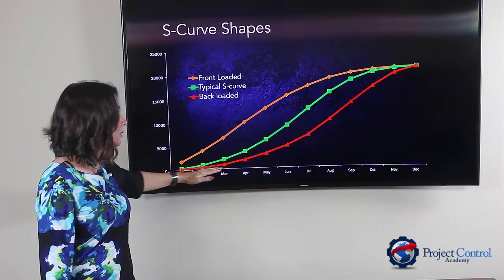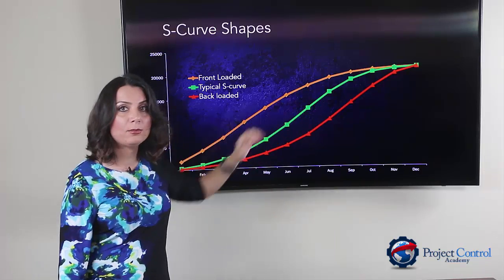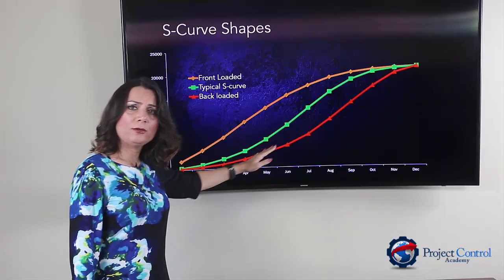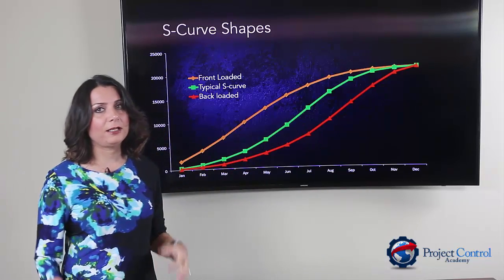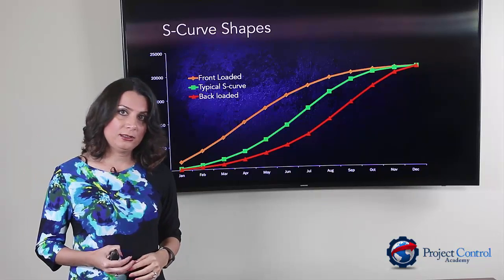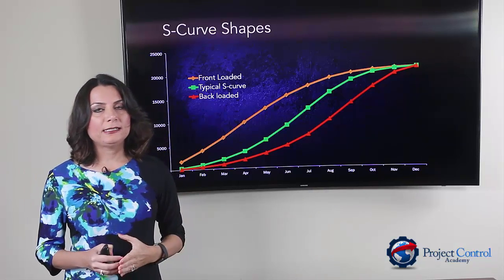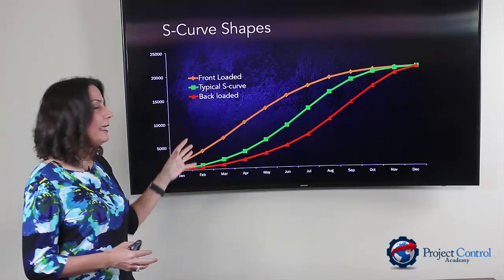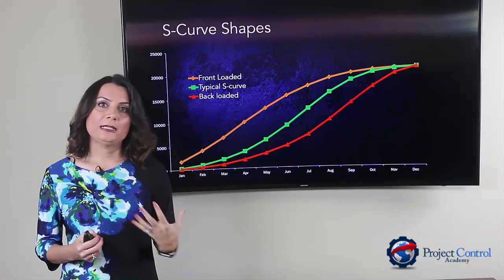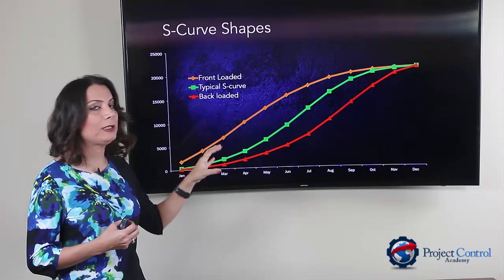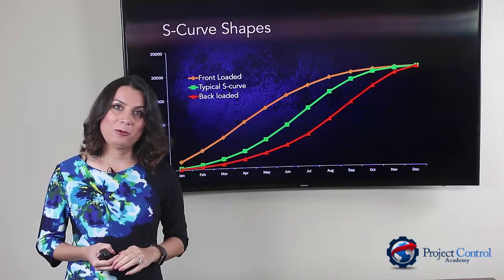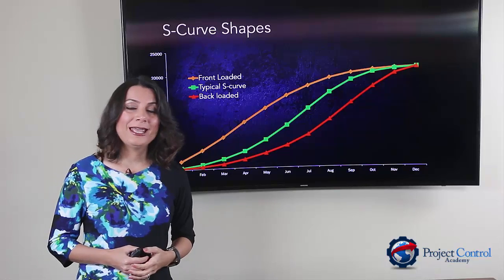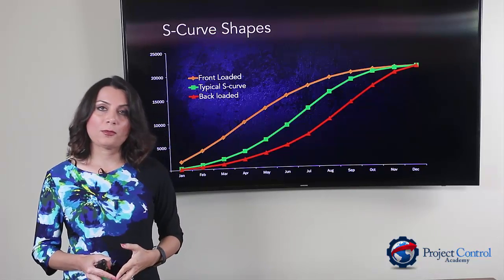The back-loaded curve starts very slowly and then ramps up toward the end. The green one is the typical S-curve — a shallow S-type curve that you will see in most projects. Make sure that you validate your plan for both front-loaded and back-loaded curves before you accept them as a baseline for comparison.